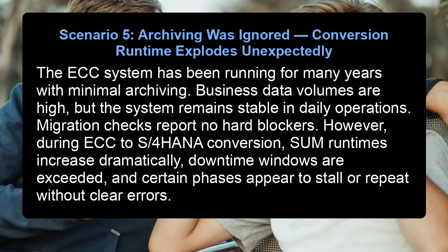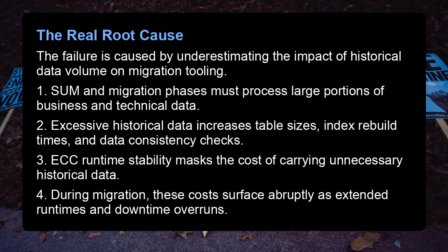However, during ECC to S/4HANA conversion, some runtimes increase dramatically, downtime windows are exceeded, and certain phases appear to stall or repeat without clear errors. The real root cause: the failure is caused by underestimating the impact of historical data volume on migration tooling.